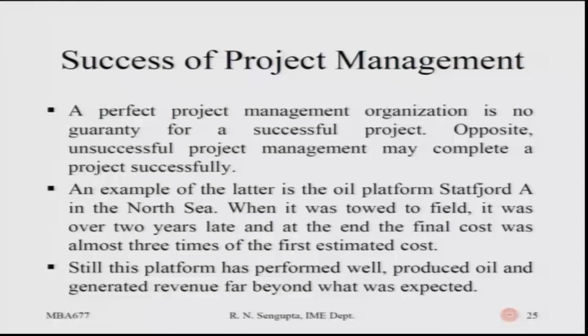An example of the latter is the oil platform at Stratford, which is in the North Sea. When it was towed to the field, it was over 2 years late, and at the end the final cost was almost 3 times the first estimated cost. Say, for example, it can be trying to build an aircraft carrier for the Indian Navy. If the cost is much higher, then the project at the end of the day may be a success, but from the project management point of view the cost may be very high.